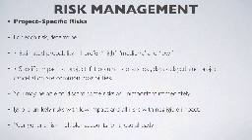You might be able to discard some of the risks as unimportant immediately after you identify them, because they have a very low estimated probability and their impact is also very low. Such risks you can rule out. Ignore unlikely risks with low impact, and all risks with negligible impact also you can ignore. Your generic risk multiplier accounts for those already.